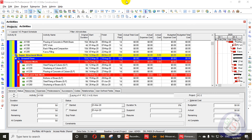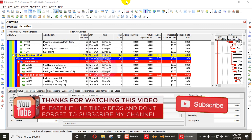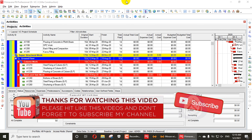That concludes today's lecture. I have shown you how to use Global Change to easily remove actuals from an updated project. If you face an error during project updating and need to remove all actual units, you can easily do it with these five global changes: reset remaining duration to original in Calculations, then create three resource assignment global changes for labor, non-labor, and material, plus one for expenses, and one to reset all activity statuses to Not Started. Please subscribe, press the bell icon, share your comments, and let us know if you have any problems — we'll make a video on it. Thanks for watching.